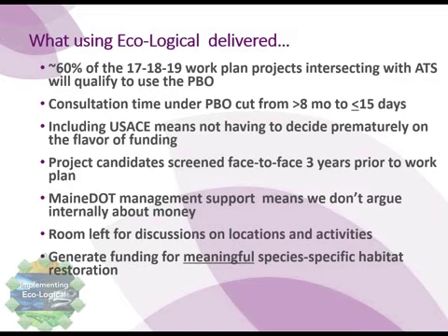We screen our candidates now 3 years prior to their inclusion in the work plan. This has created a little bit of a glitch in that you have those couple of awkward years that you're trying to catch up, but we're just telling everybody to hang on.